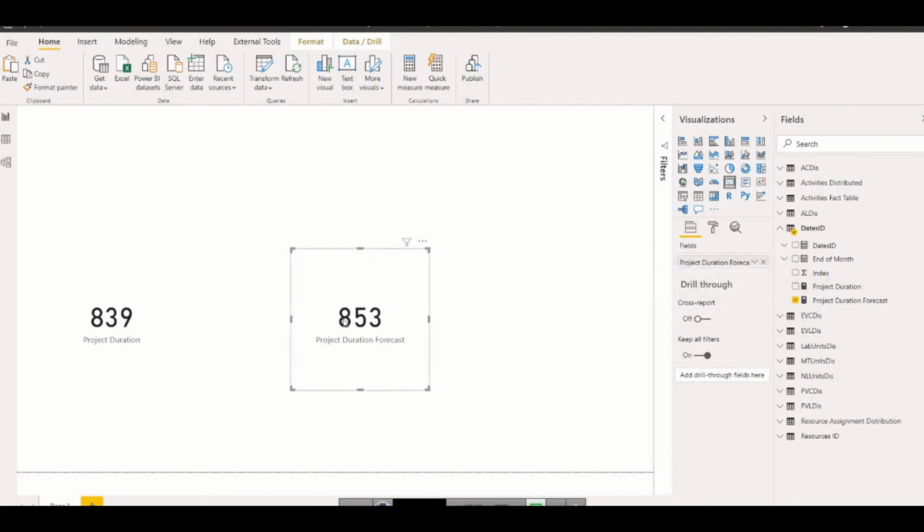Okay, so what else do we need? Now we want to calculate the project elapsed duration. I will not be using this as a measure because I don't want to use this. I want to use the comparison through the baseline, but if you want, you can calculate for yourself from the forecasted date. The forecasted date can be changed in every update, so they are variable. So I will be working in this whole training based on the baseline dates.